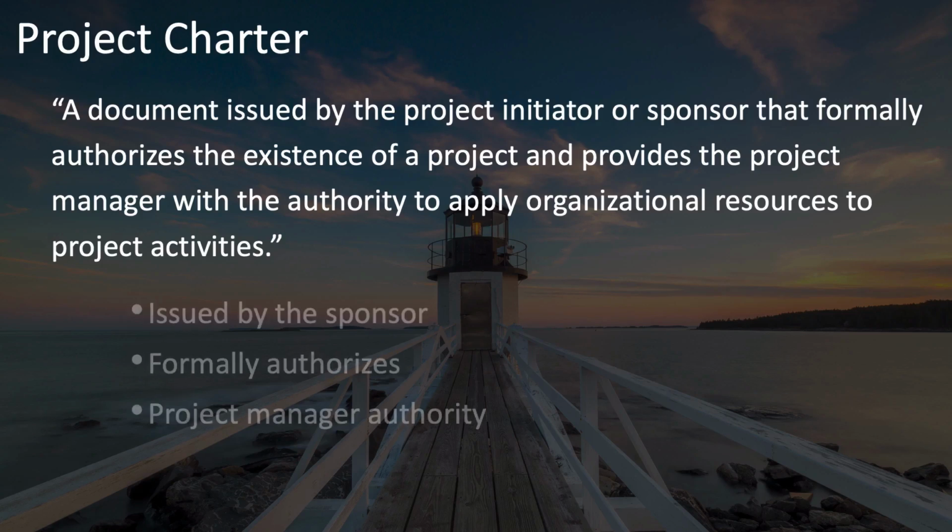Key points here are that it is issued by the sponsor, not the project manager, although the project manager can and probably should help. It formally authorizes the project and provides the project manager with the authority needed to get the project going and manage it.